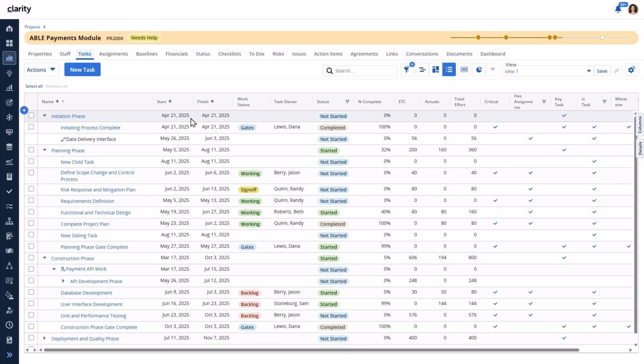The expandable tree is now available in the modal for the Copy From action, making it much easier to select tasks from other investments. Previously, the Copy From action was only available from the timeline. Here in the grid layout, the Copy From action is now available, allowing you to pull in tasks from another investment and return back to this layout.